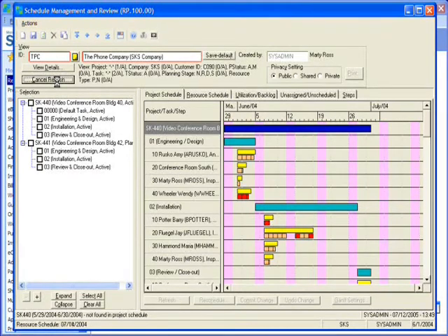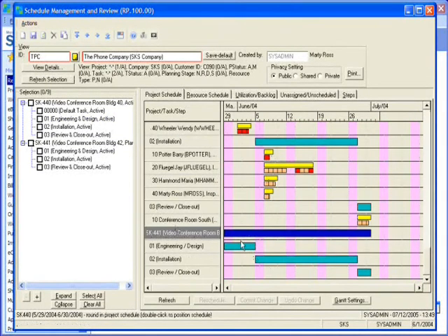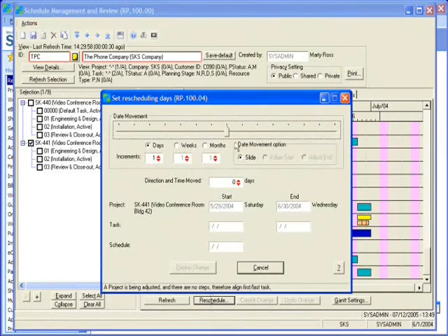It is, but that's what we actually want to do. Remember, let me look out here to show you. We jump out to this project, and we'll see that remember, it got scheduled in here at these dates because we copied it from 440. Roger. Well, what we really want to do is push it out to 712 because after all, some rates for people that we selected on the estimate might change as a result of effectivity date changing. Yep. So if we reschedule it before we generate our estimate and quote and stuff, Prep will handle taking that into consideration. So let me just slide this out here.